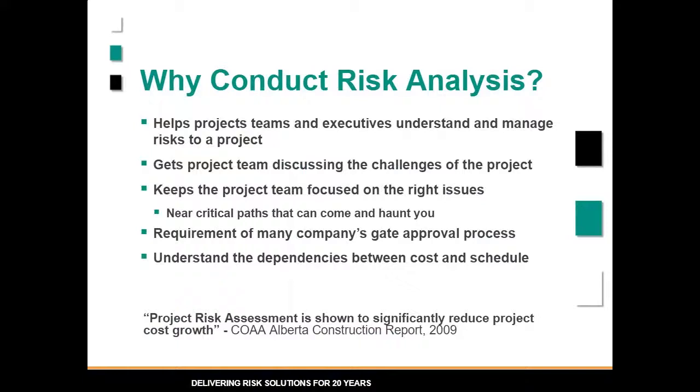So why do we conduct risk analysis? Well, risk analysis helps our project teams and executives understand and manage the risks to the project. It gets the project team discussing what the challenges will be and what they need to take action on. And hopefully, it highlights issues before they become problems. It helps us identify critical and near critical paths that might come and haunt us in the project. It's a requirement of many companies' gate approval processes. And ideally, it helps us understand the dependencies between cost and schedule. Now, I say ideally because a lot of times we can't do that. We have to run a separate cost risk analysis and schedule risk analysis, and we really want to be able to run them together.